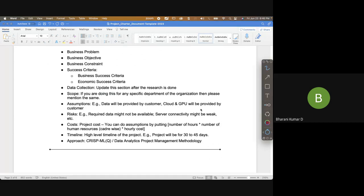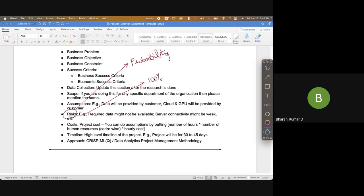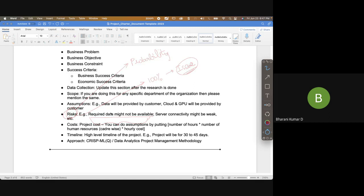You can also list down the risks. Remember that there is a difference between a risk and an issue. A risk is something that might happen in the future — it has a probability associated with it and may or may not occur. When a risk becomes true or reaches 100% probability, it is called an issue. Issues are dealt with using issue management; risks are dealt with using risk management.